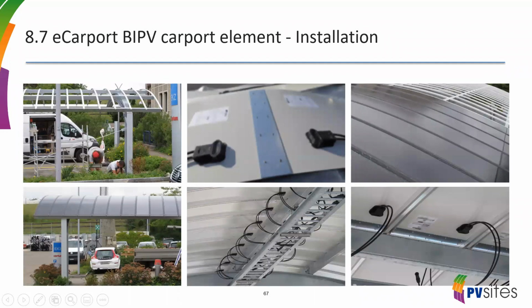This is the different steps of the whole installation to the final one. It's actually going pretty fast. At the moment that the main structure is built, then the photovoltaic roof is actually done in one day. It's really something that goes really fast. And under the roof, there's a cutter, and all the cables are connected and combined in this cutter. Next one.